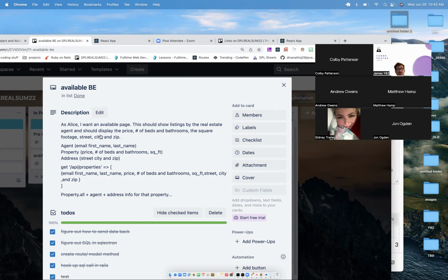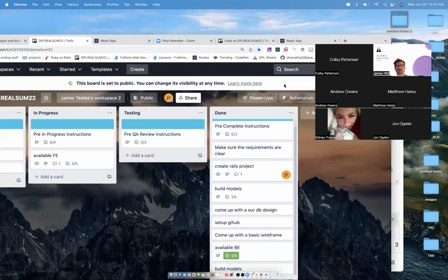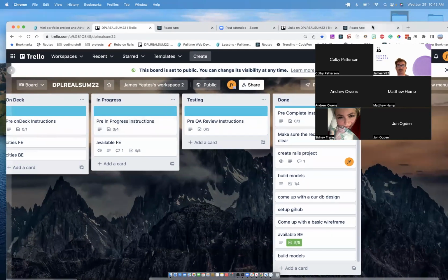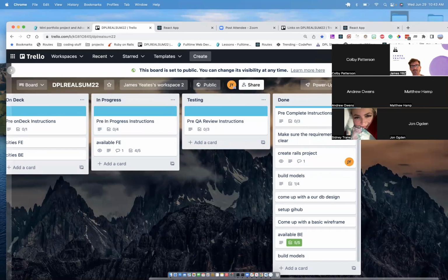They're going to ask you, what did you work on yesterday? What are you working on today? And are there any potential blockers or places where you're stuck? This is why a Trello board's nice, because you would have 7 people in a meeting. Someone would be sharing their screen and you would be looking at a Trello board. And I'd be like, hey, Sally, what did you do yesterday? Or ask Sally those 3 questions.